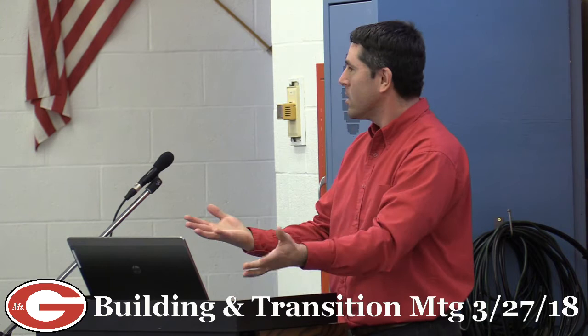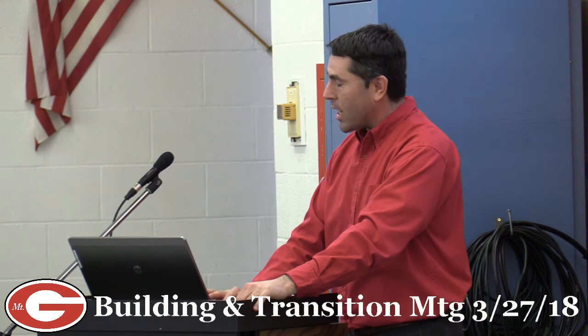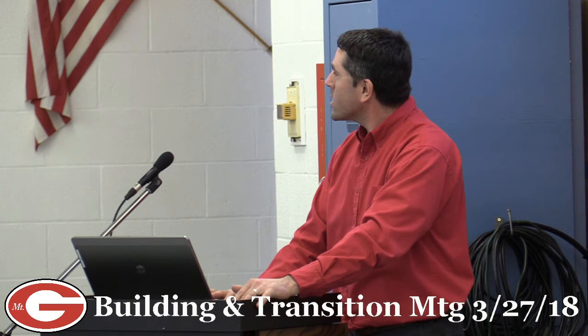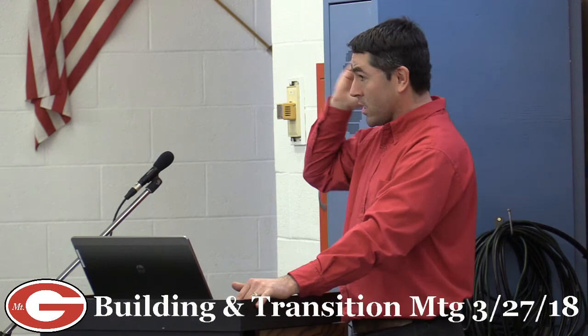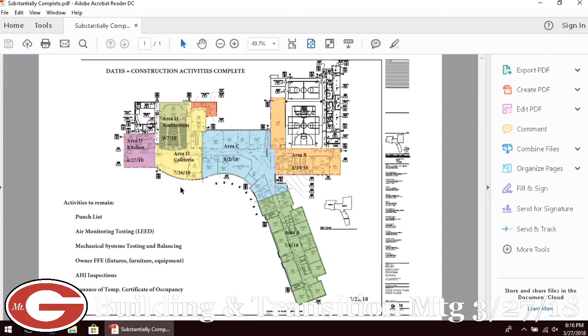Winter, unfortunately, didn't allow for that. But Monday, our site work contractor is going to be remobilizing on site to start a lot of the hardscape work right adjacent to the building, and then a little bit of the area back here, and they are also gearing up to mobilize. So come as soon as the kids let out for the summer, they're going to be redoing the parking lot as well over that 7-week period before the kids return.